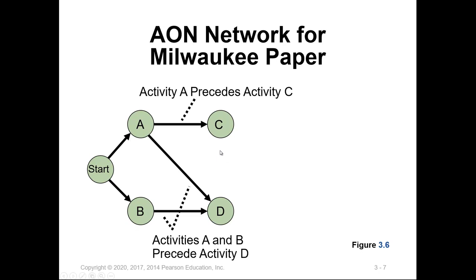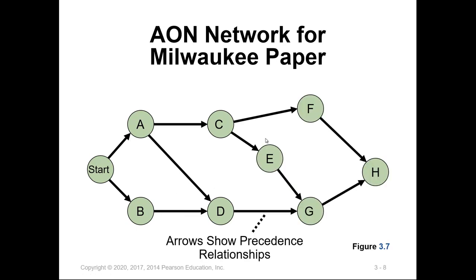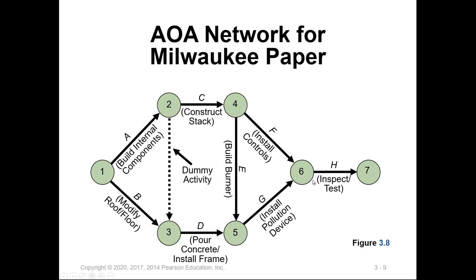Activity A should be completed to start activity C, while we need to complete both A and B to start activity D. Once we complete activity C, we can start E and F. Once we complete D and E, we start activity G. Once F and G are completed, we can start activity H. This diagram shows the same example using the activity on the arrow approach, and we need to add a dummy activity to explain how we move from one activity to another.